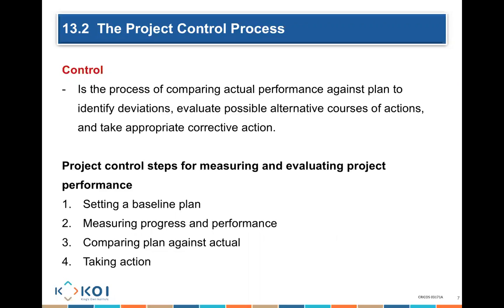For example, I might have been expected to finish all the tasks for week 6, but we check and we haven't even finished the task for week 5. So what is that? Well, we are actually falling behind. So we need to identify those deviations and decide, all right, what are we going to do now because we are actually falling behind?